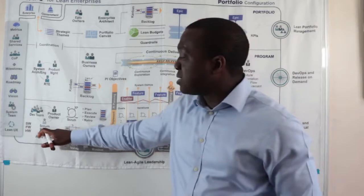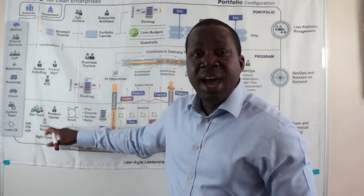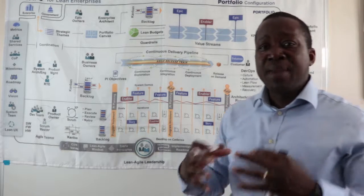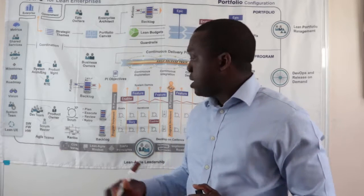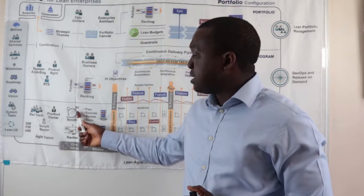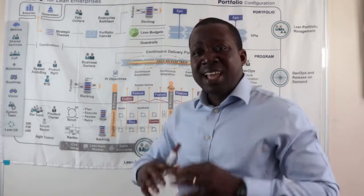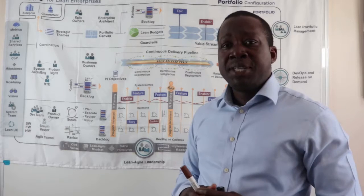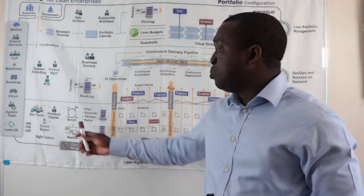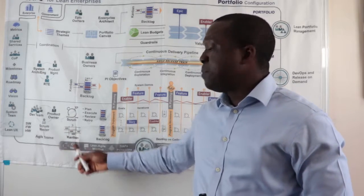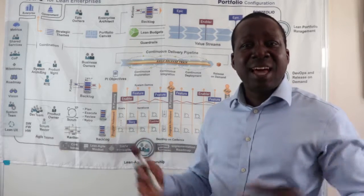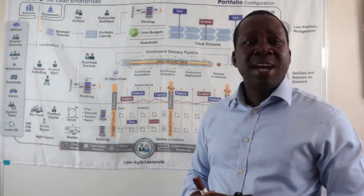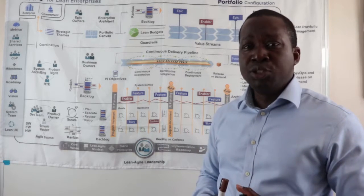We've got the Scrum Master acting as a servant leader and the Product Owner refining the backlog and making sure that the backlog is ready for the team during the PI planning event. The frameworks that exist within the SAFe team include Scrum, XP, Kanban, and the teams will also be acting as DevOps teams using various software languages to build their solutions.